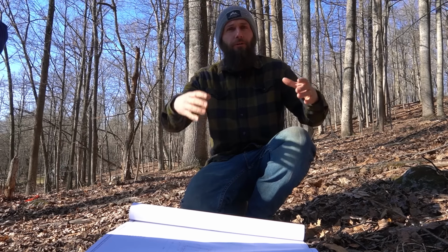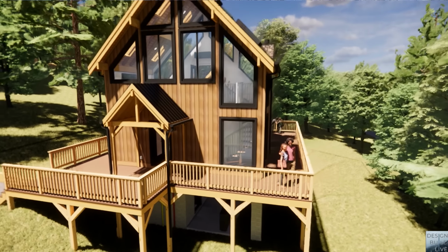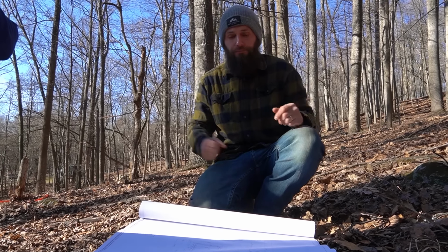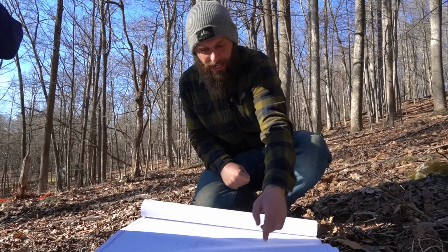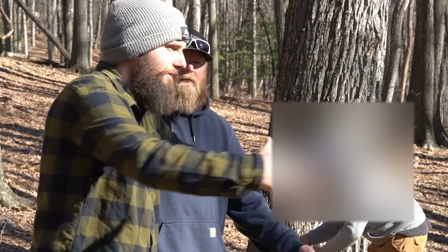Original plan was to do block going up or concrete. We decided to change that out and raise the footer up to a few inches above grade and use 22 inch cedars to come up so it has a treehouse feel to hold the house up. And they're also going to do the little pier footings for the deck, and there's I think like 16 or 17 of those around there. They're going to be a 16 inch sonotube. We might build that deck around there too.